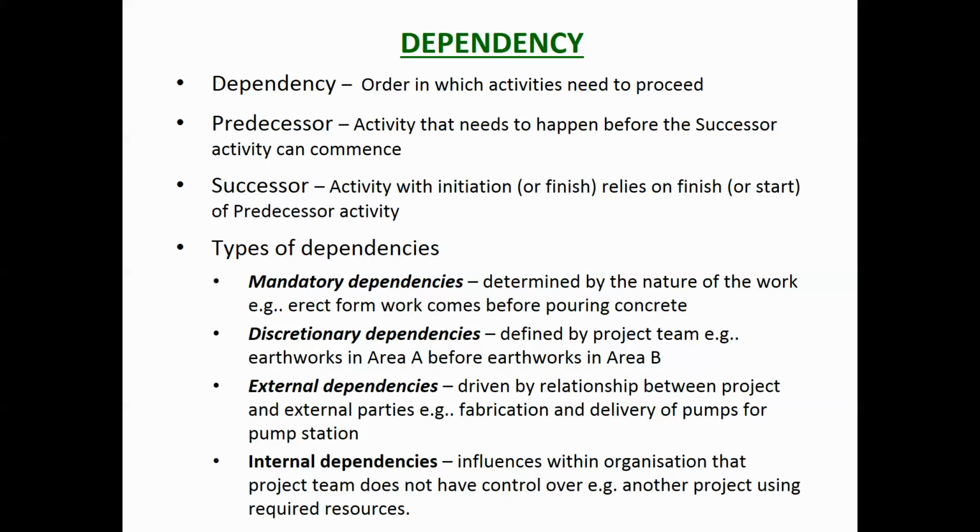Another good example is if you're building a pump station, you might need special pumps from Germany. It takes 6 months for them to build it, commission it, and ship it over. So you need to structure the program or the sequence to allow for the fact that the pumps are going to come later. It might be that ideally you'd be putting them in April, but they're not going to arrive until June. So you put them in then and you restructure the activities around it.